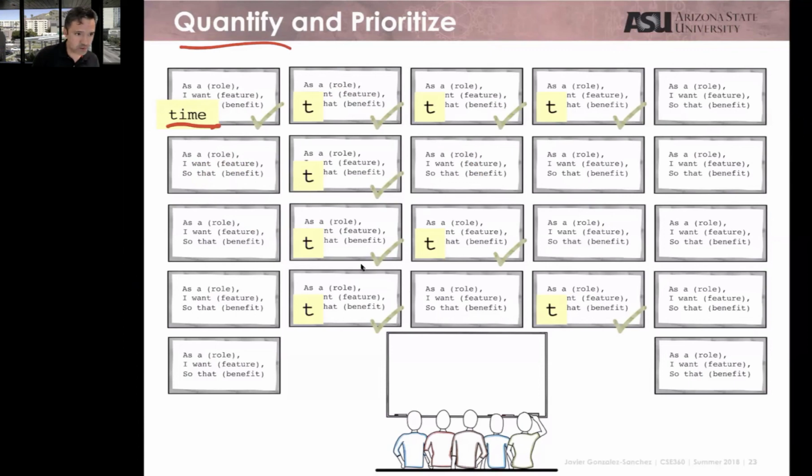Also, for each of those activities, working with the customer, tell me which ones have a priority. Is it more important to sell the book, or maybe it's important to contact the seller? Okay, selling the book is more important. Contacting the seller can wait for 2 weeks. Oh, register the users. Is it important to register the user in the first week? Or we can start working with some users that we already have registered, and then registering users can wait for 1 month, 2 months. Tell me, which one is more important for you, customer? Priorities.